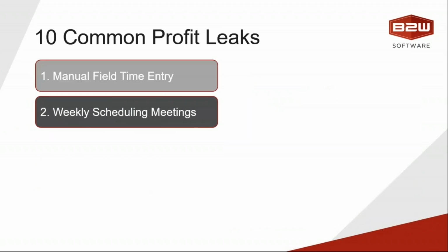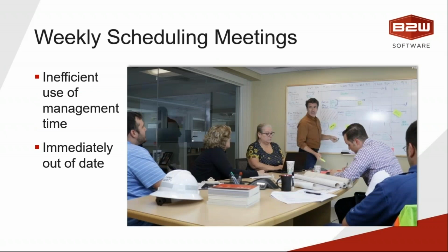Number two item, that's one of my favorites, the weekly schedule meeting. Now, I know at Brubacher, we used to meet every week on Wednesday afternoon for 2 hours. The COO, the Director of Field Operations, the Fleet Manager, some key project managers, and some other important folks would assemble in the conference room, and they would do the scheduling of people. They would update the 2-week look ahead for people and equipment. And they actually did it on an Excel spreadsheet that was projected, not a whiteboard, but a lot of companies still use the whiteboard.